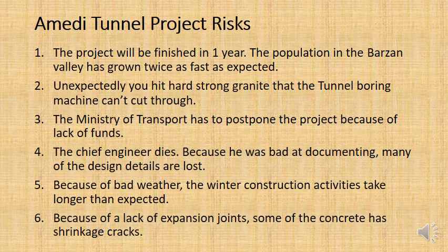Number 4, this is probably a smaller impact risk, but yeah, the chief engineer dies. So the engineer who was most in charge of design, he dies, and because he was very bad at documenting, and the drawings and the specs weren't written up fully, much of the knowledge of the design details is lost. They only existed in his head. Well, that's going to create a lot of delays, because basically you're going to have to redo a lot of the design work. So that's a little bit of a risk too.